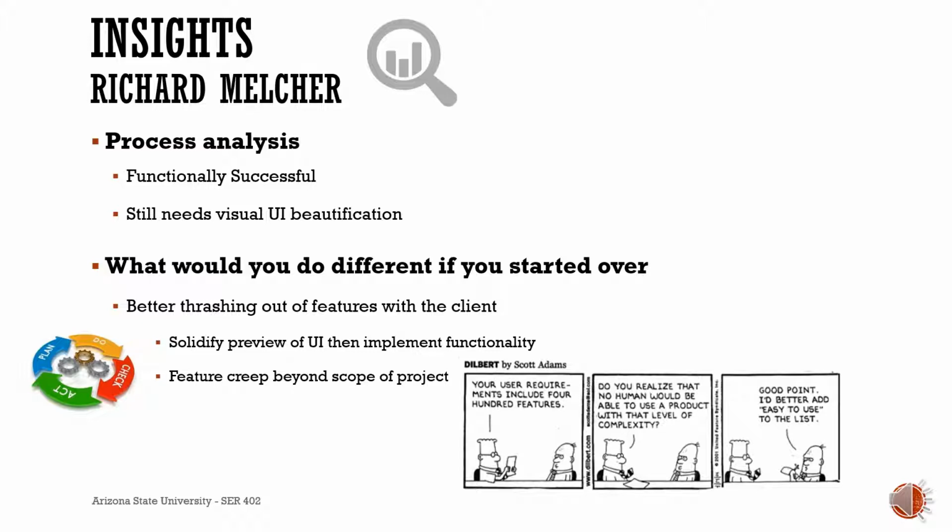At this point in our project, our client is satisfied with the functionality of the application. However, to achieve a minimum viable product, they have requested UI beautification. To this goal, we have created several user interface stories the business has approved for acceptance of the final deliverable. These recent changes were not in the initial proposal and are a sign of feature creep and changing project requirements.